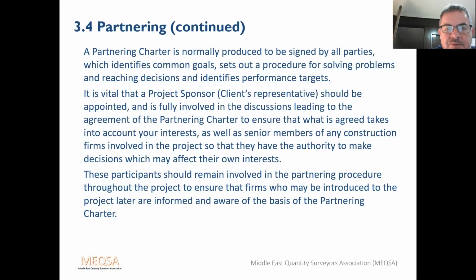It's vital that a project sponsor or the client representative should be appointed and is fully involved in the discussion leading to the agreement of the partnering charter to ensure that what is agreed takes into account the interests of the client as well as senior members of any construction firms involved in the project, so that they have the authority to make decisions which may affect their own interests. These participants should remain involved in the partnering procedure throughout the project to ensure that firms who may be introduced to the project are informed and aware of the basis of the partnering charter.